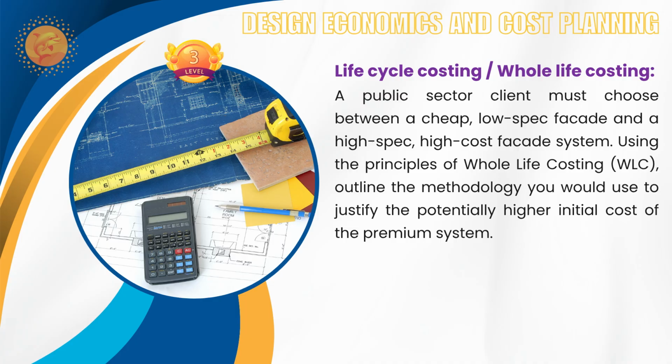That also will have a higher cycle of maintenance and repair and lower salvage cost. That includes less thermal productivity, that may need a higher energy consumption cost of operating. So all these things you have to compare, and find the financially sound investment which is going to give you overall benefit based on the whole life costing, because it's not particularly for initial cost only, it is going to be for whole life costing.